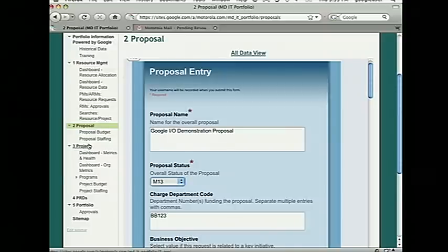But what people always want to know is how we're doing named resource management. So we could have people enter their resource requests in a form, but we have large projects at Motorola, and you can't ask someone to enter a form entry 50 times. They're just not going to do it. So what we have is a spreadsheet. It is a spreadsheet, but the users are actually happy about this. They enter very little data. They enter like the user's name that they want, the project number, and then the spreadsheet app script goes and pulls all the other data from the master, because we've got user masters and project masters, and it pulls all the data back. It validates all the information they put in.